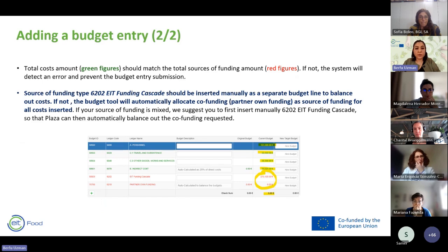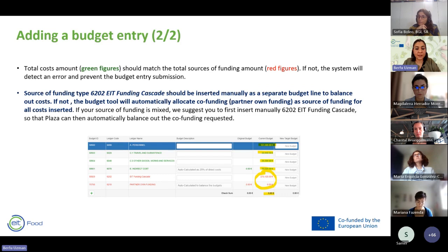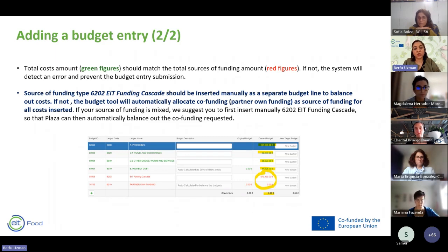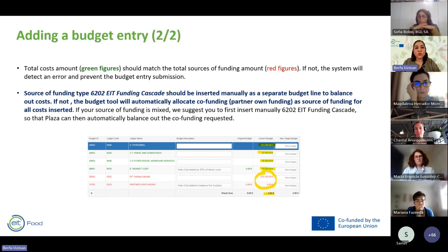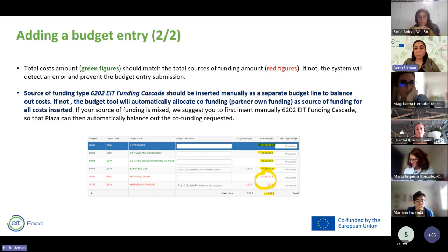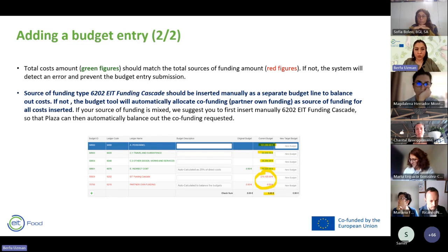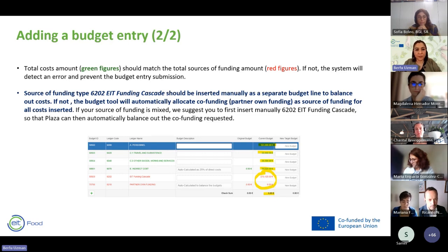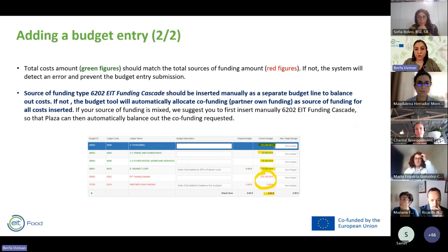An important note about budget entries: the total cost amounts shown in green must match the total source of funding amounts shown in red. If not, the system will detect an error and prevent submission. The source of funding type with code 6202 — called EIT Funding Cascade — must be inserted manually as a separate budget line to balance out the costs. Otherwise, the budget tool will automatically allocate co-funding as the source of funding for all costs. We suggest inserting 6202 first so Plaza can then automatically balance the rest to co-funding.